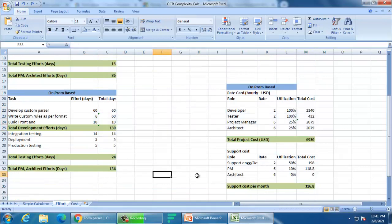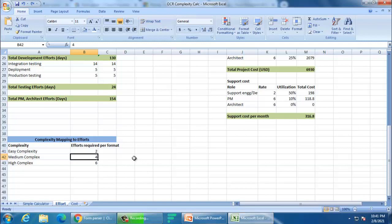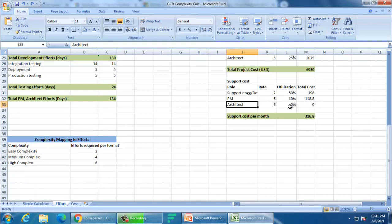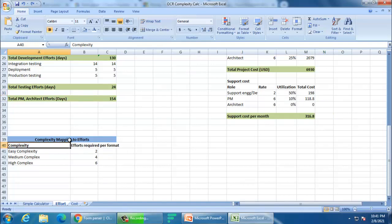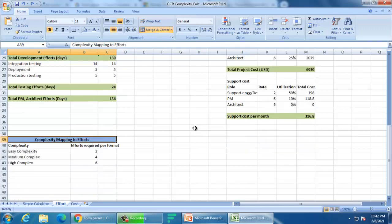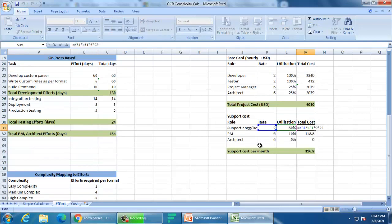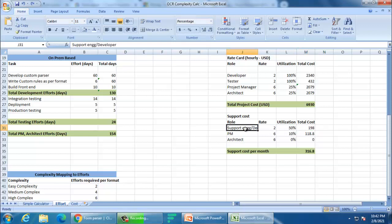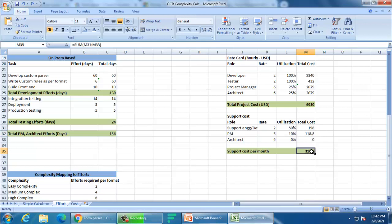You also have to calculate the ongoing support cost. A support engineer at $2 per hour, with a project manager architect put at 0% and project manager at 10% — very little project management is required in support. For complexity, we had already calculated that. The support engineer will spend 50% of time at $2 per hour. Totaling up, you are spending $316 per month regularly to support this project. So your base is ready.